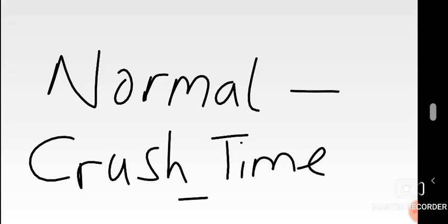That figure you get, for example, if it gives you 2, what does that 2 mean? Meaning you can only reduce an activity by that much. If there was an activity 1 to 2 with a crash limit of 2, it means that activity can only be reduced by 2 days. That's all it means.